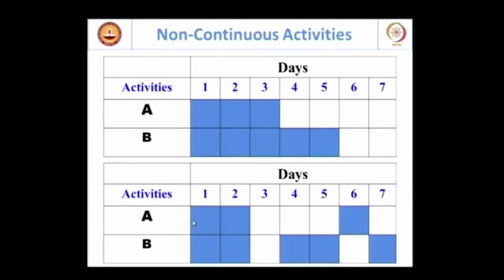We can also split up the effort in a duration for the activity, because that's what often happens. For example, A could be done by a person who is not available on day 3, 4 and 5, which means you need the flexibility to represent it in a non-continuous form. So do keep in mind that your bar chart does not need to have a continuous representation.